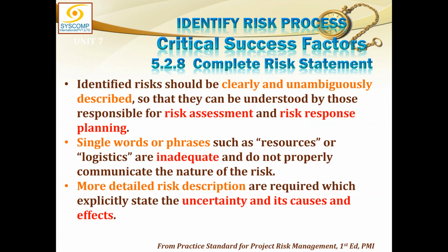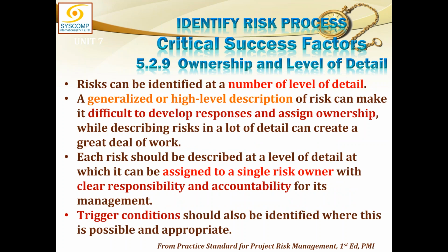Then the complete risk statement: cause, risk, and effect. Identified risks should be clearly and unambiguously described so that they can be understood by those responsible for risk assessment and risk response planning. Single words or phrases like resources, logistics. What is the risk called resources? What is the risk called logistics? These are inadequate and do not properly communicate the nature of the risk. More detailed risk descriptions are required, which explicitly state the uncertainty, its cause, and its effect. We'll talk more about that, but for the time being, ownership and level of detail.